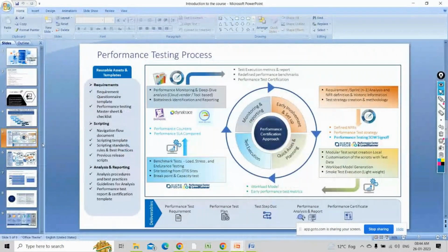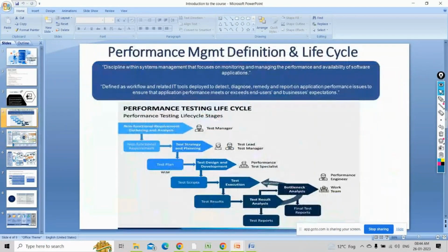So once we have finalized the project, we have understood the performance life cycle. These are the 10 steps that happen in a project, the steps that we need to perform. You can skip steps also, so it's not mandatory. Just one thing, you need to wait till your test plan is created. You cannot work on the design or start working on the scripts; no, that doesn't happen.